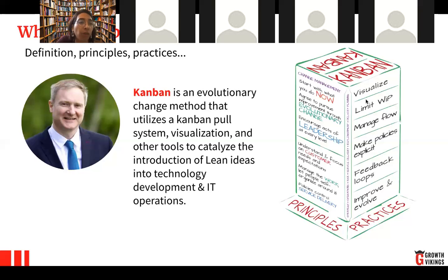Third, it manages flow, okay? And that means by actually limiting the work and identifying the value streams and mapping them, it allows us to see how work operates, what the stages of work are, and at what stage what we deliver is. At what stage is what we're delivering, yes. So it allows us to manage flow also because it increases predictability of the work, and also allows us to manage the capacity available to deliver that work.